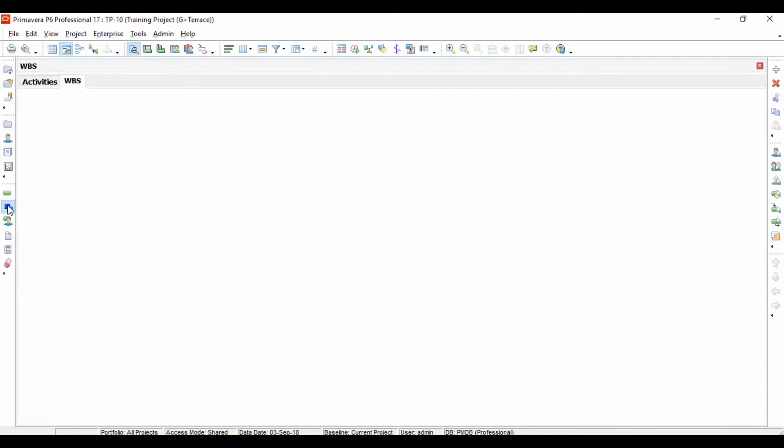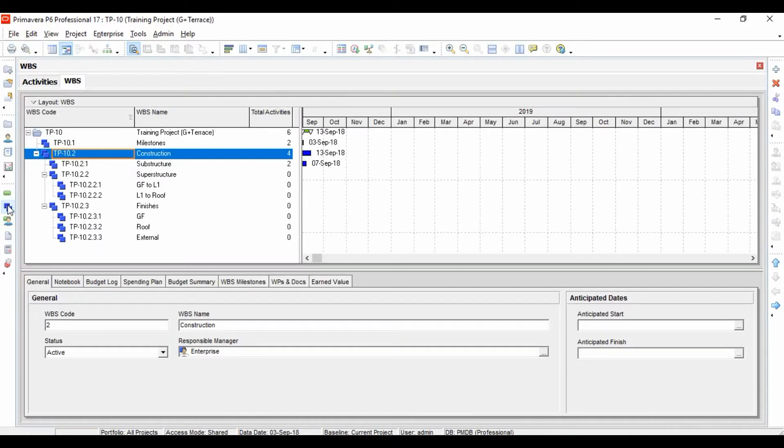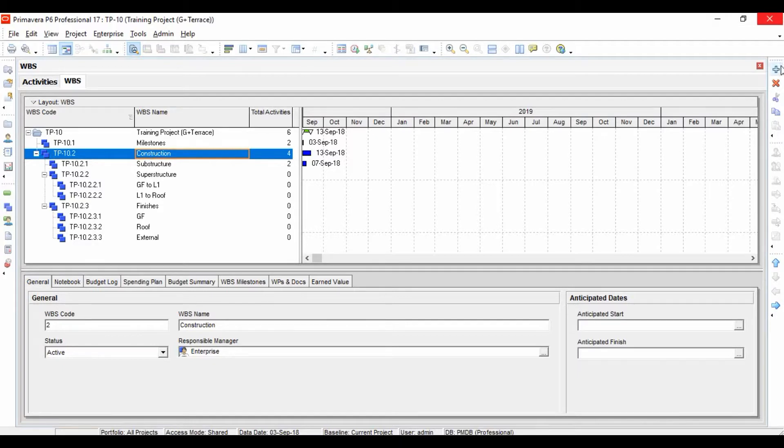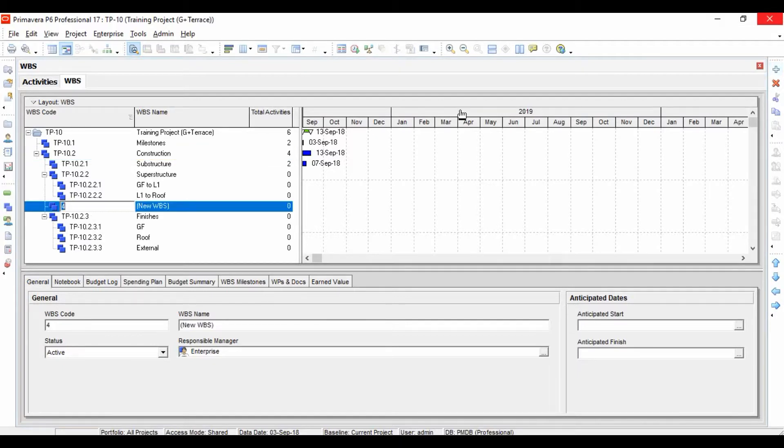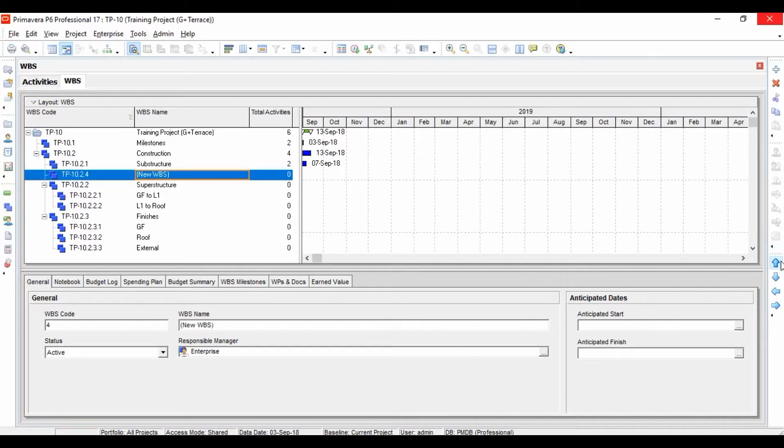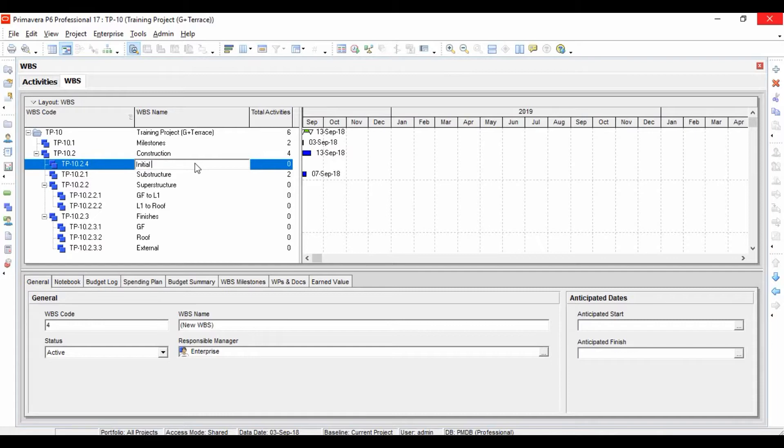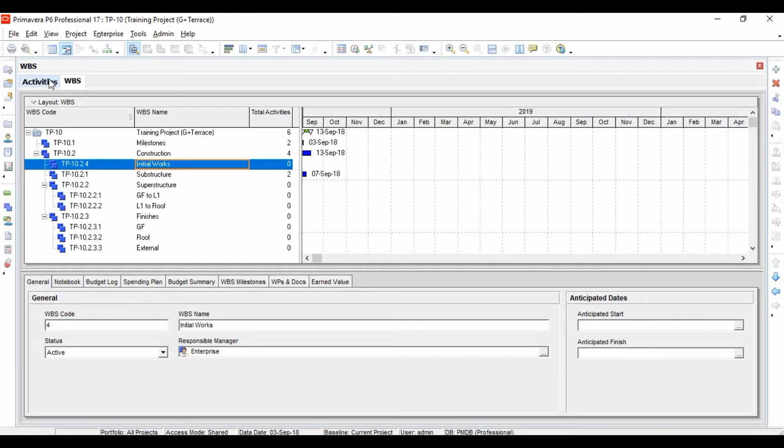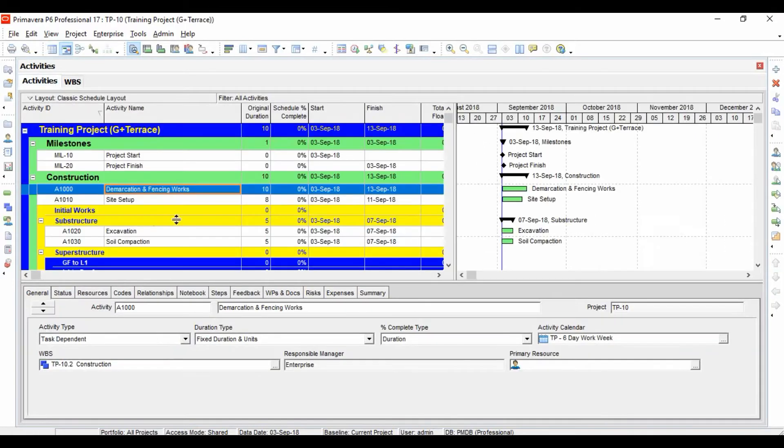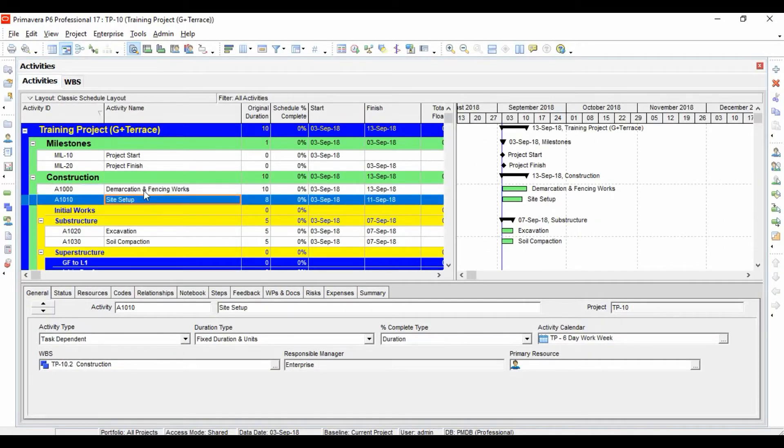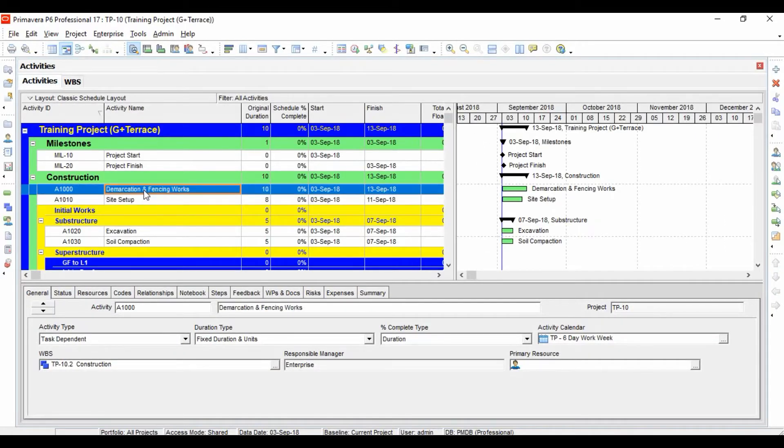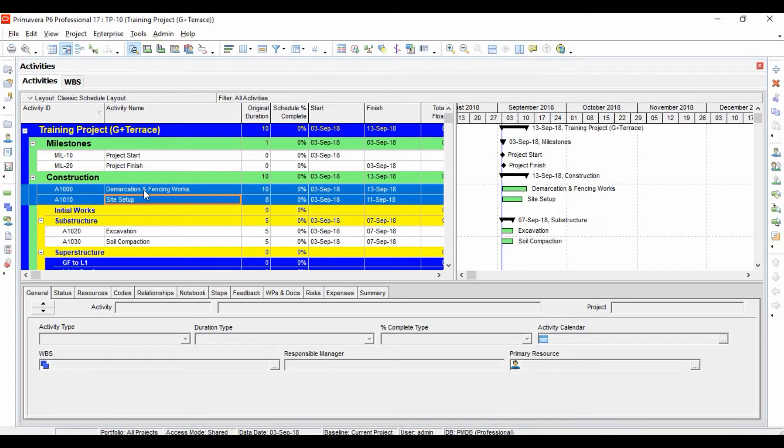If you want, you can create a WBS. Come to the WBS window, let's come to Construction, let's add a new WBS, click on this and move it up. Let's rename it as 'Initial Works'. Let's come to our activity window, and you can see that WBS reflected over here.